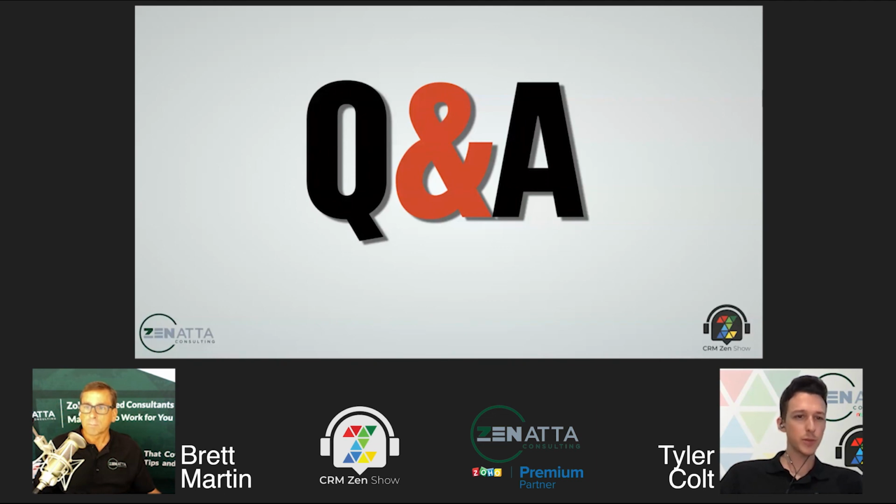We had a quick question about milestones. Milestones are set to active, inactive, or completed statuses. Once you finish all the tasks or task lists underneath the milestone, it should update itself to completed. So you don't have to go in and manually say that you've completed a milestone. Once everything's done underneath it, it should complete itself. If you're not experiencing that, get in touch with us or Zoho support, and we can help facilitate that, because that is how it's supposed to be running for you.